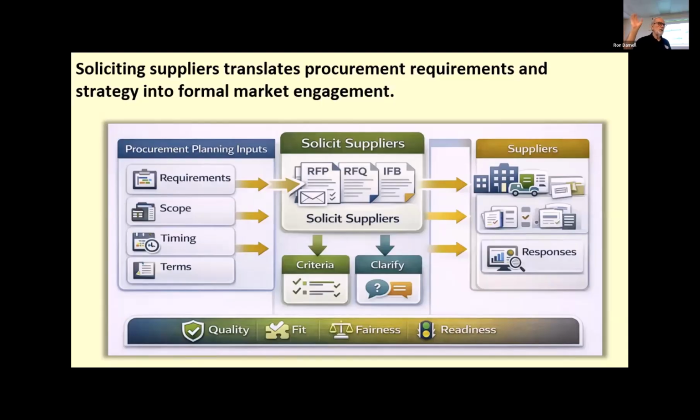But in that case, you would be the seller. But when you're going out and buying things for the project, or acquiring things for the project, you're the buyer. So in all this conversation, we're looking at this from the perspective of the buyer. The project sourcing team prepares the procurement documents, communicates what's needed, and invites qualified sellers to respond.